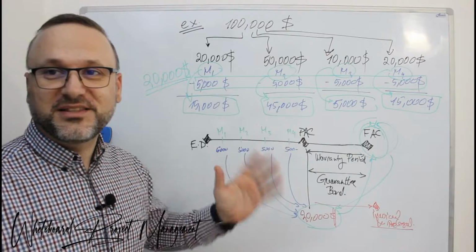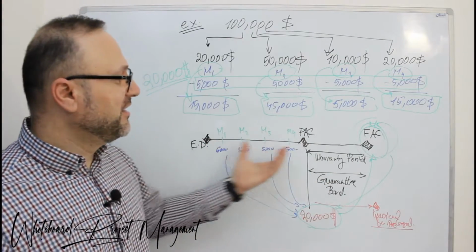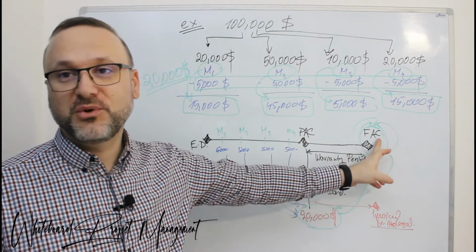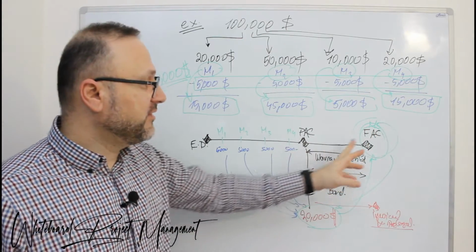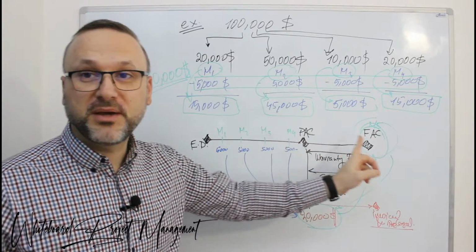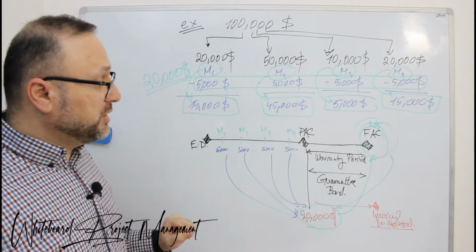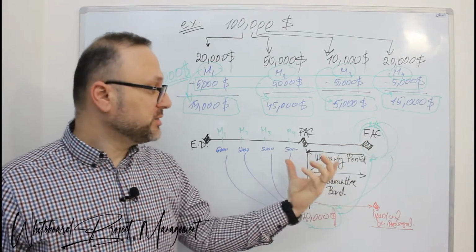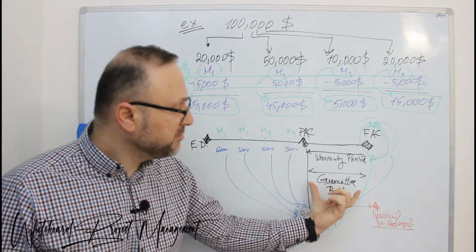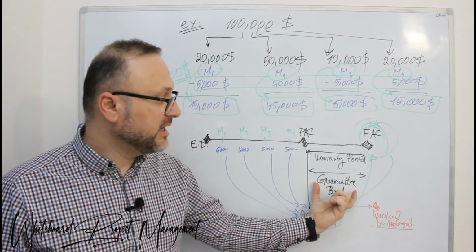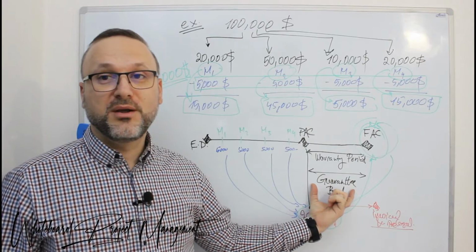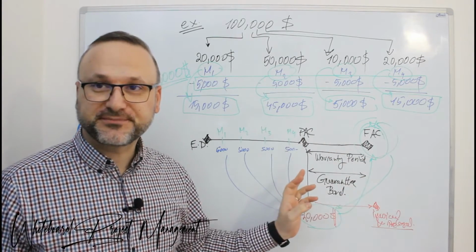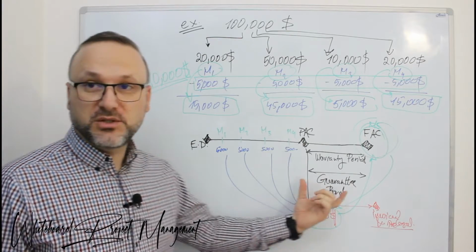And another way that it is the same value, but the client is mentioning that I have the final invoice here at the end, and the final invoice is depending on some period of time. Why is this used? This is used if the contractor is not capable to prepare the guarantee bond or bank guarantee for the period of guarantee. This is the aim why it is used.